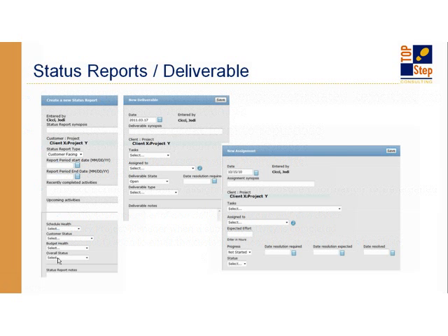Okay. So you'll notice here this doesn't have anything to do with bugs or customer sources or issues or severities. It's really just a nice, succinct informational form, and you can use it internally and with the customer as a way to track status. Here's a deliverable example where the deliverable is actually tied to a specific task in the project plan. And then you can assign it to an individual person. So, Jody, you're responsible for the end user guide, okay, which is attached to the training activity, which is a pretty common setup in our world.